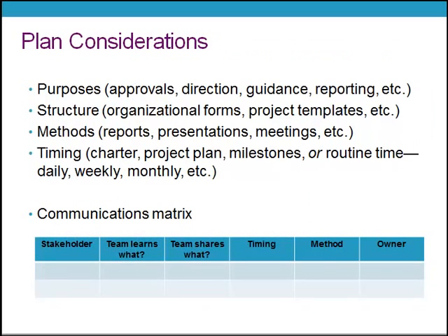Items that are taken into account in developing the communication plan involve, first, the purpose of a given communication. For example, advising on project status, requesting changes, or notification of milestone completion. Second, structure. Are there internal forms that must be used or adapted, or some other required way that information must be conveyed?